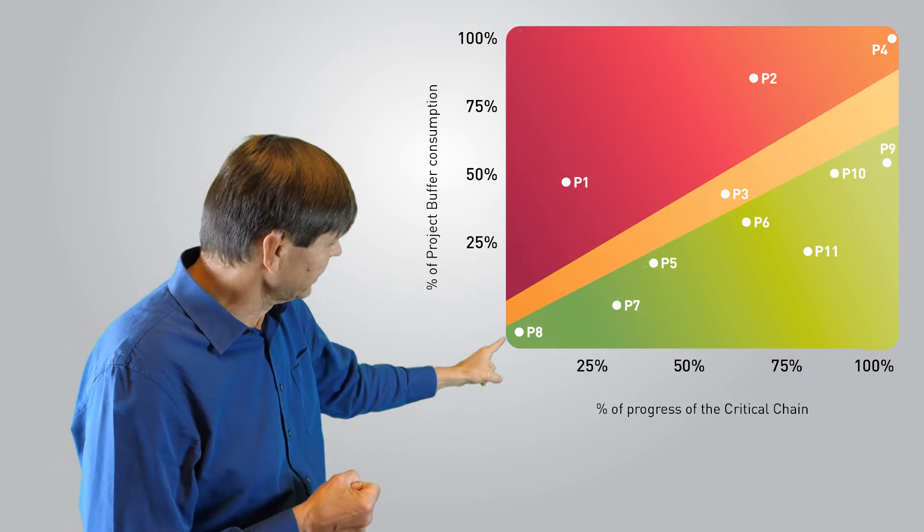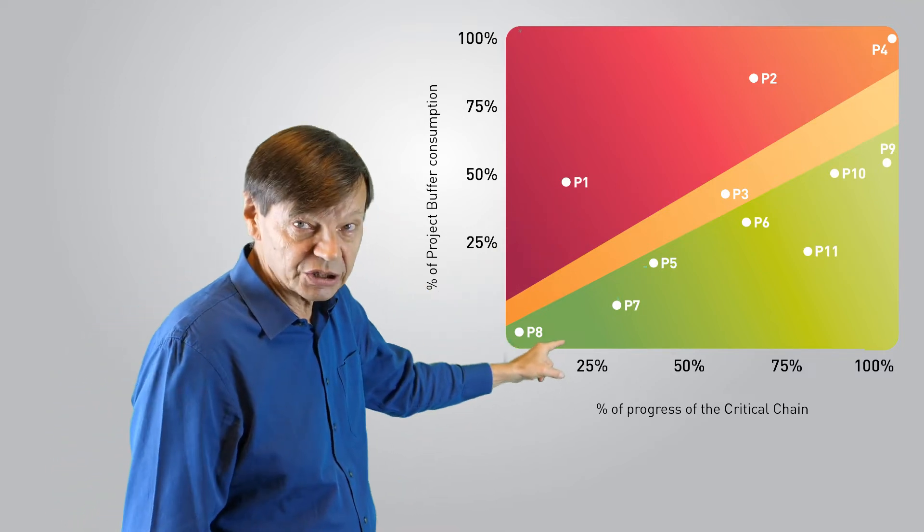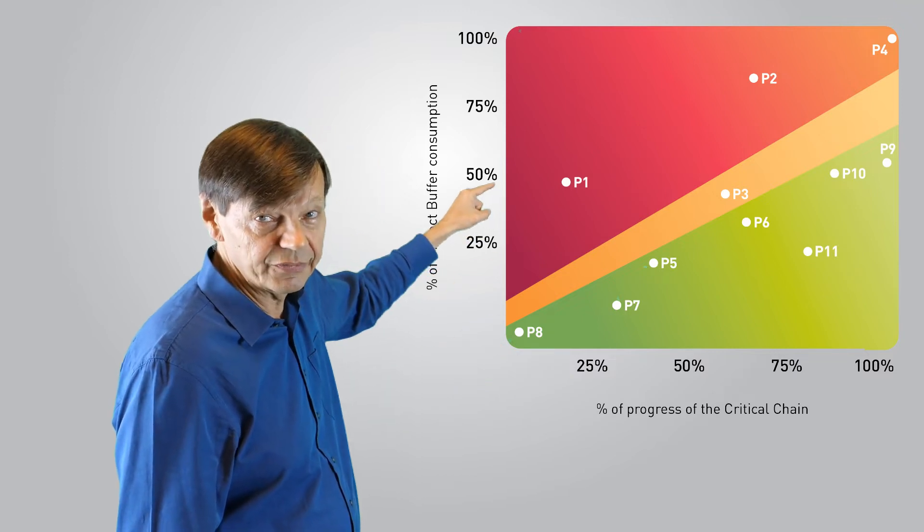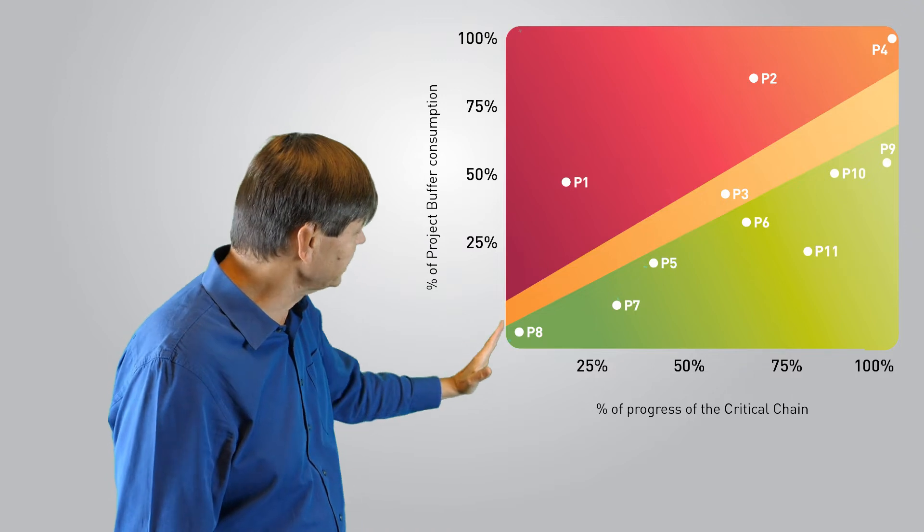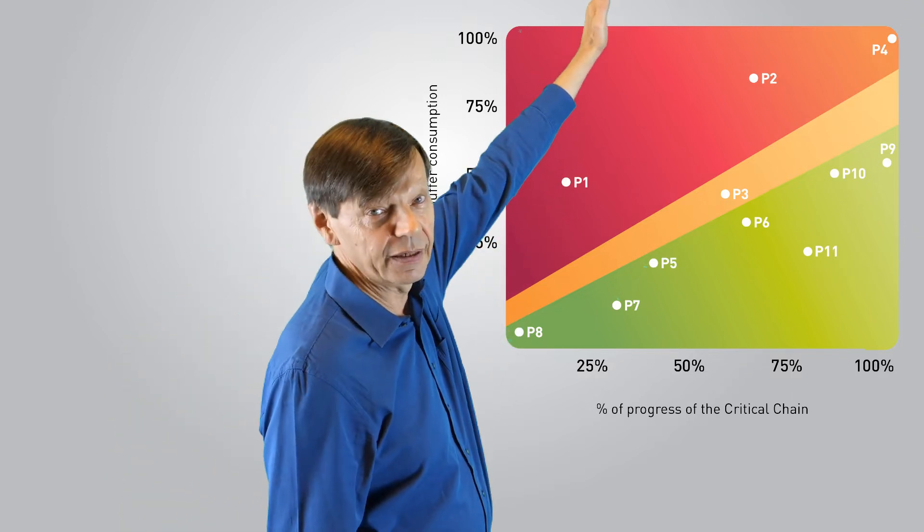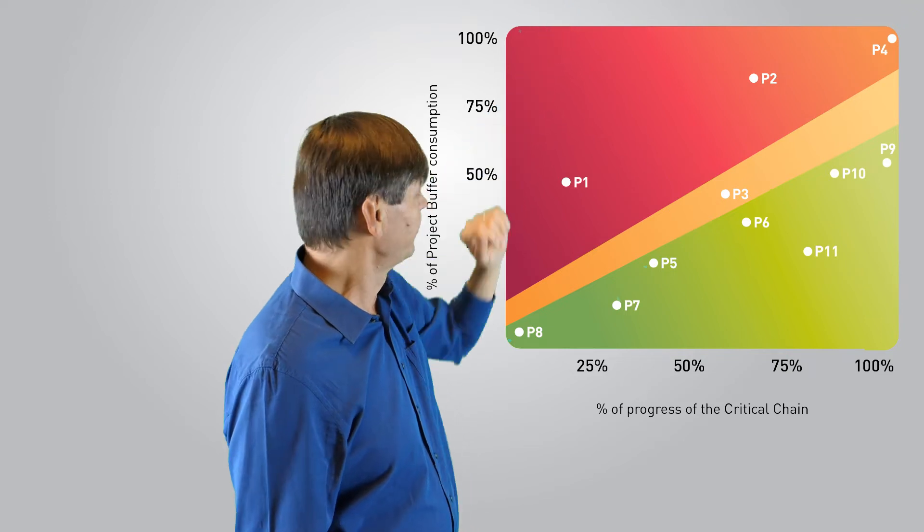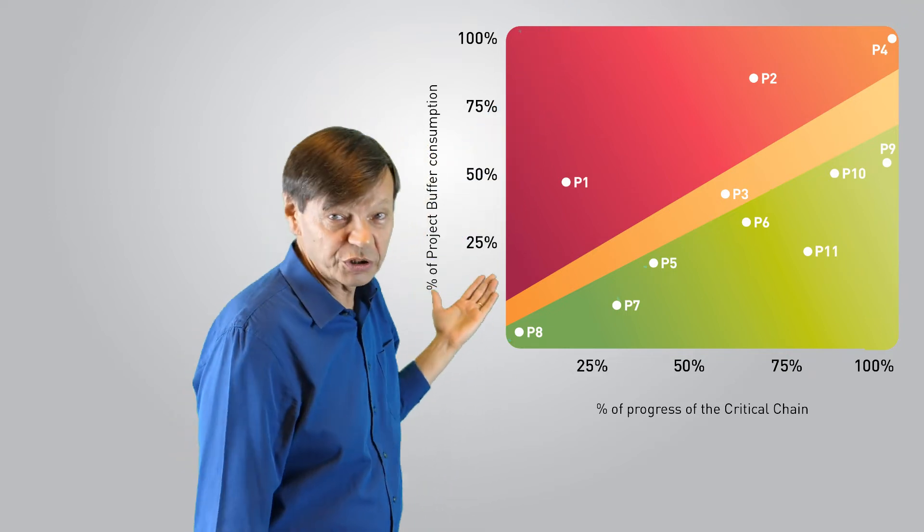Because that project has not progressed very much and yet it has consumed a lot of its buffer—nearly 50% of the buffer. So if it carries on like that, it's just going to go up up up like that and it's going to finish very very late.